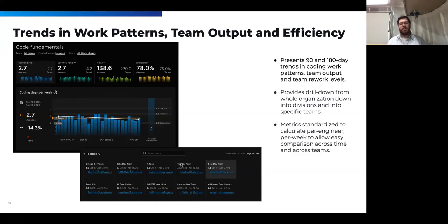The idea here is that we're able to standardize these metrics, unlike historical ways of measuring like story points, which one are estimations, but two very much team specific, and almost impossible to compare apples to apples because of the team size, the project complexity, the number of points, the area of the code base, the tenure of the team, etc. Flow is designed to do away with those team specifics, regardless of those factors. Somebody's ability to make frequent contributions to the code base should not be impacted. So we allow easy comparison across large organizations to get that general benchmarking and team health understanding.